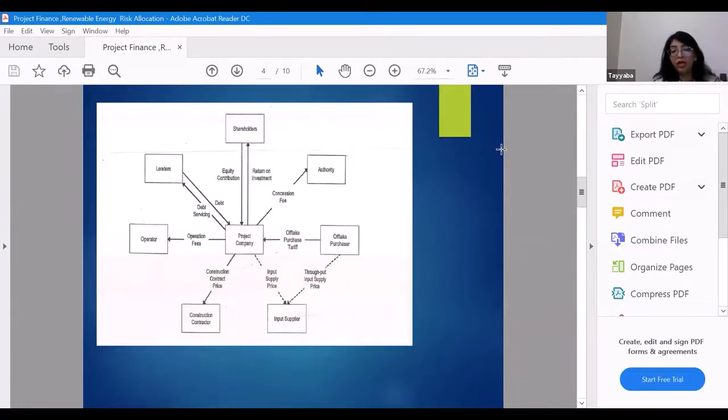So you are able to ring fence this arrangement as far as your obligation to the power purchaser is concerned, which is the government of Pakistan, whom you have to supply energy to. Naturally, the contractor is not working for free, so you need to pay the contractor. Where is the money coming from? The money is coming 80% from the lenders and 20% from the shareholders.